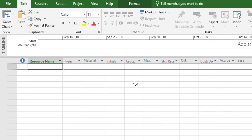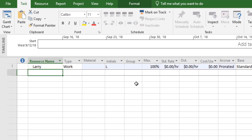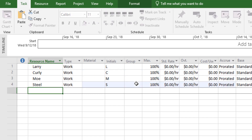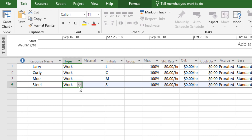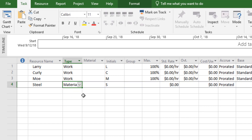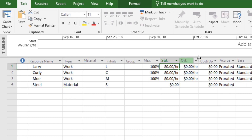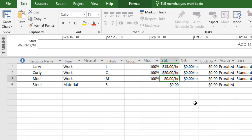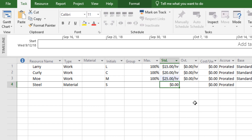We have three team members: Larry, Curly, and Moe. I'll type their names in the first three rows of the sheet, and then put steel at the bottom because that's the material I want to track. After entering those resources, I need to change the type for steel from work to material. Then I'll assign hourly rates: Larry is $15, Curly is $20, and Moe is $25. For steel, we're going to price it by the ton at $600 per ton.